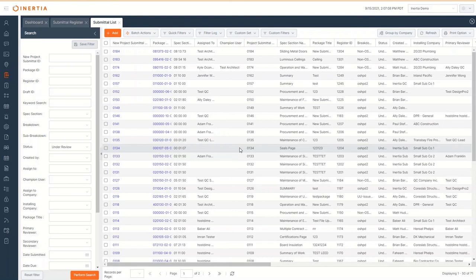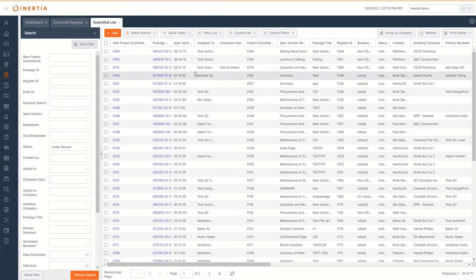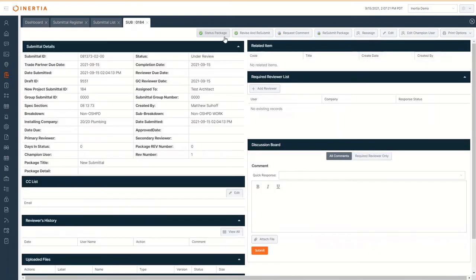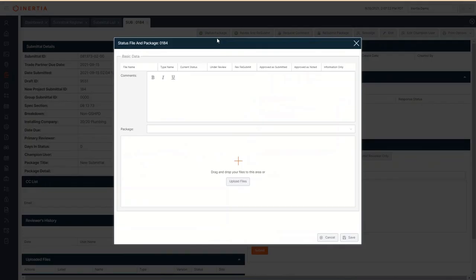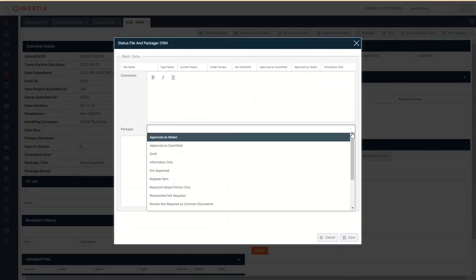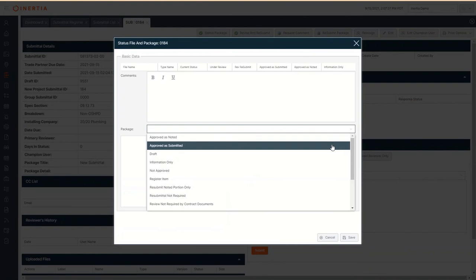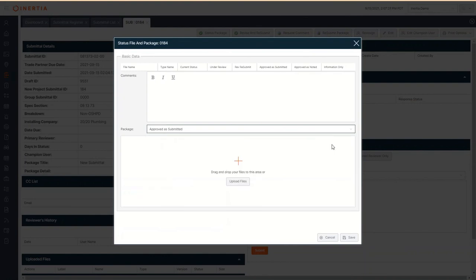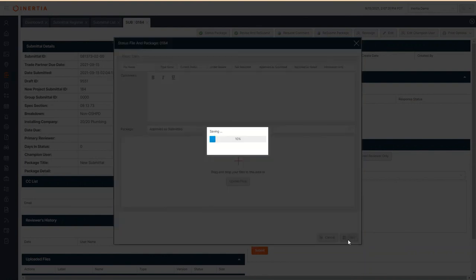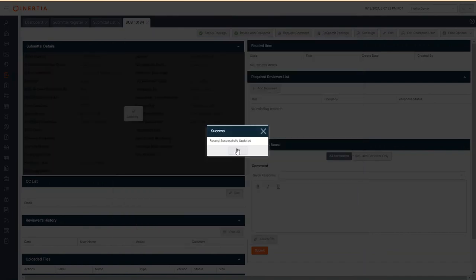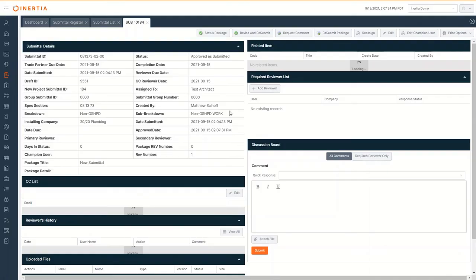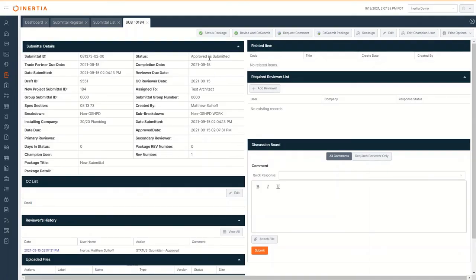In this case, I'm acting as the architect who is reviewing the particular submittal looking at the submittal details. I have workflow options here in the top right. After I've reviewed the package, I can click status package where I'll type in any necessary comments and change the package status per my review. This submittal meets my design criteria and so I approve it as submitted. Once I click save, I can see the status in this record has been changed to approved as submitted.